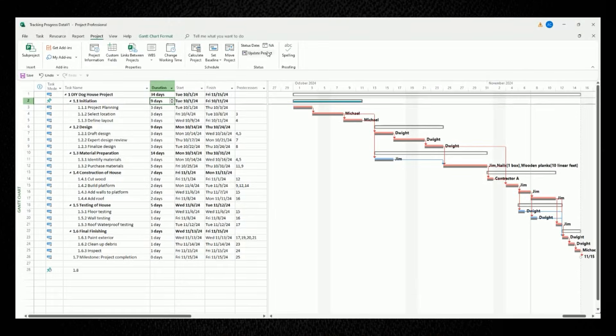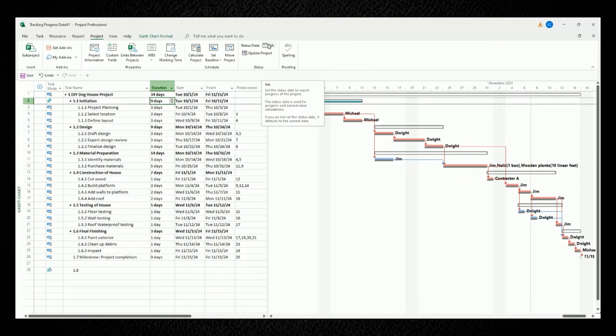This status date feature in Microsoft Project is the date that you're entering in the latest updates for your project's tasks. Keep in mind that your status date should not be a date in the future because you can't update tasks if the work hasn't been completed yet. Makes sense, right?